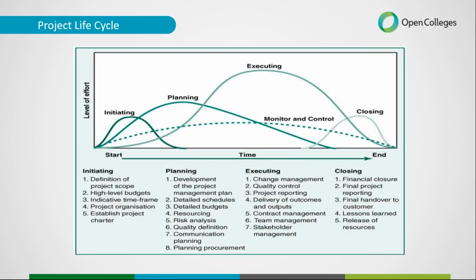So the beginning stage is the initiation stage or the concept stage of a project, and that's where the idea is there to start the project, and all that high-level budget and time frame is established, the project charter is established. And basically the project manager is put into place and given the authority to start moving into the planning stage of the project. So, you know, the board or the sponsor will say, yeah, this is what we want to do.